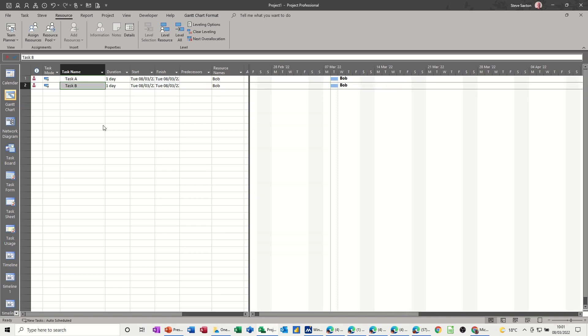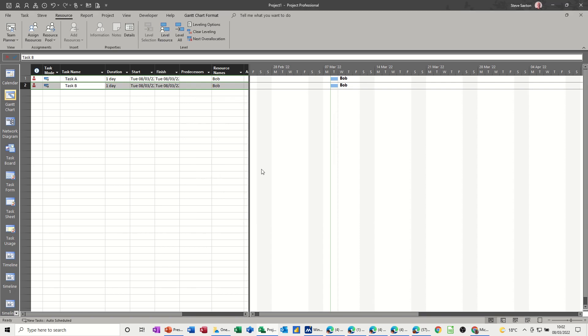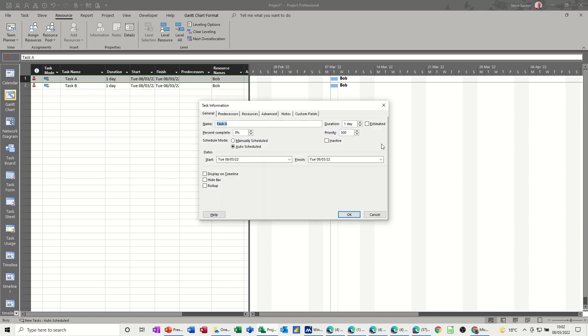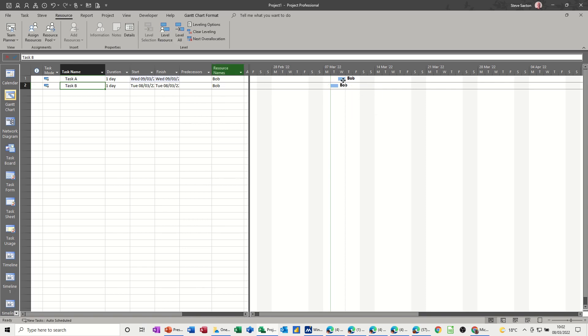If I want to give a higher priority to task B, that will force the top task A to move and not B. So if I'll do that, I'll just double click onto task B, and I'll put that to 600. So when I level now, the top task should move, because if I double click into it just to check, that's still on 500. So this now is a bit more important. So level all, now the top one's moved, because that's got a higher priority than that. So whichever one's got the higher priority is more important than the one with the lower priority.